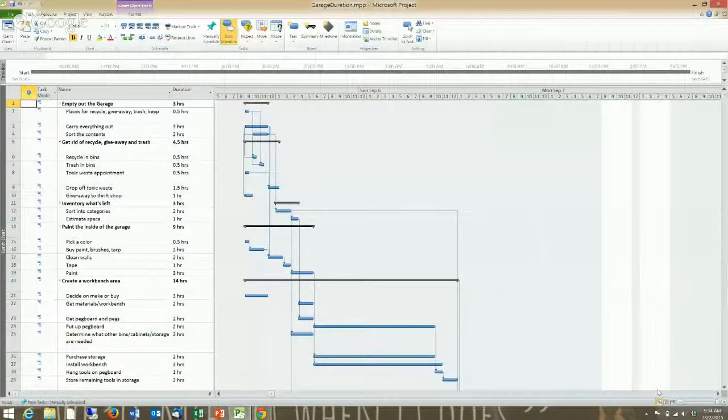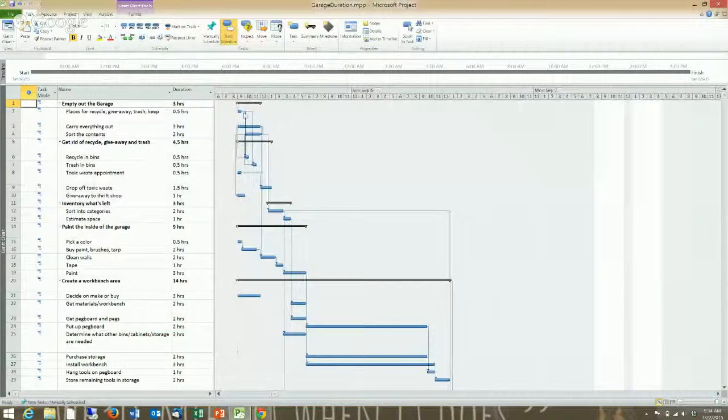Now we get stuff in a little closer, right? Now I've put the duration in project in all of the tools. Really, you just plop them in, whatever it is. These are all hours. I've told it they're all hours. You're going to have a little trouble reading that, I think, unless that's my own screen resolution over there. But each of these says 3 hours. So what will happen is when you put the duration in for the subtasks, your tool will add them up for the task. So you can see where for anything particularly complex, a tool is really going to take a lot of the burden off of you, and it's going to be a lot less error prone.